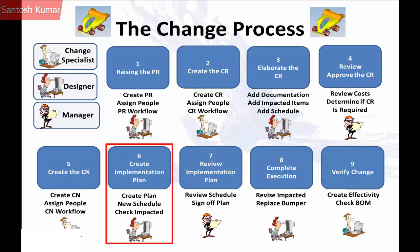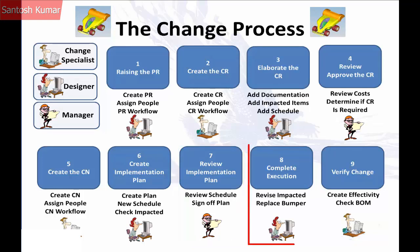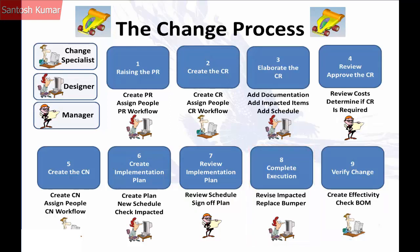The designer now checks the impacted parts and creates a detailed plan for the update. Next, the change review board reviews and then approves the solution. After approval, the designer creates the required parts, updates and revises the assemblies. Finally, the change specialist checks the plans and processes and approves that the change is in place.